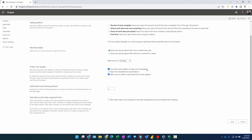This setting is really helpful because you can run into mayhem if team members enter time via timesheets while PMs also change percent complete. The proper way to handle this: if someone worked eight hours on a 16-hour task but is done, the PM should update remaining work to zero. I'll import all timesheet classifications. I'm not going to allow users to define custom periods for their tasks - I'll deselect that. I think we have everything set, so I'll click Save.